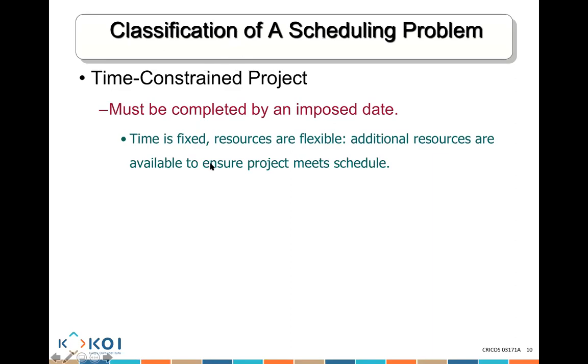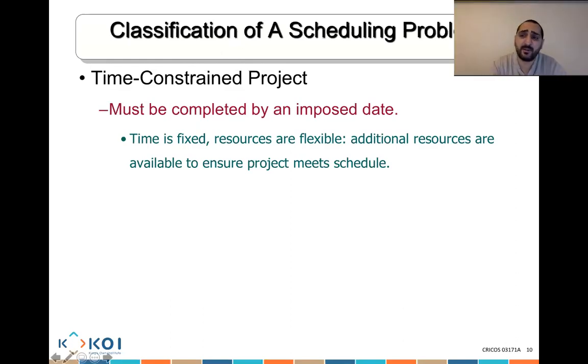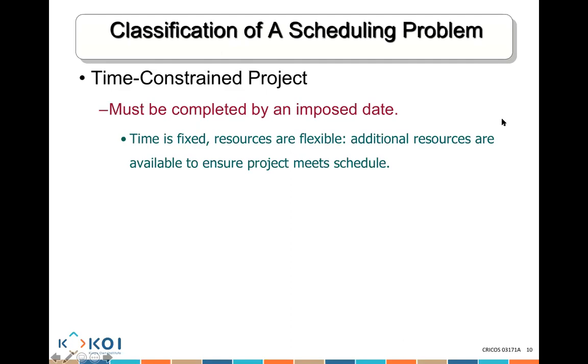Now, time is fixed. If you need more people to finish it, that's really important. I'm going to give you an example outside IT, in a construction company. When you are signing a contract with a big builder and you're building a building, if you are late by one single day, there are fines that could exceed $20,000 per day, just because you're late one day. It is really important to finish on time.